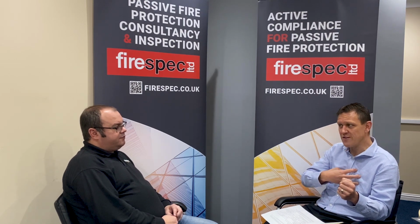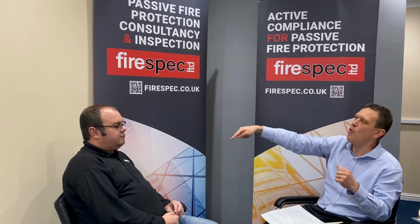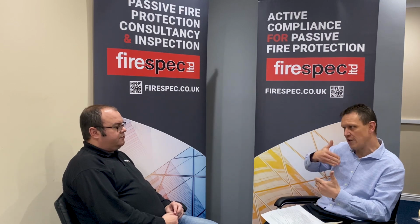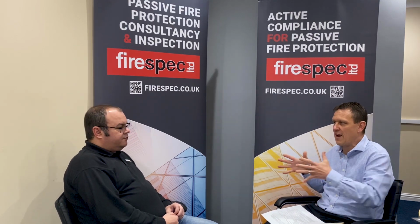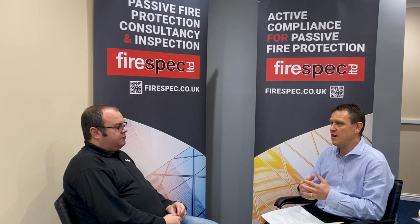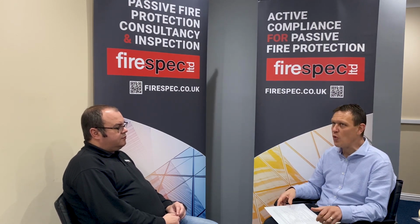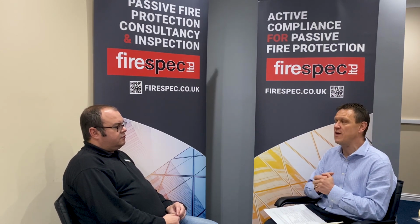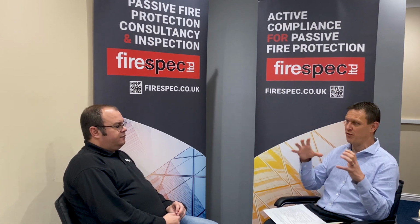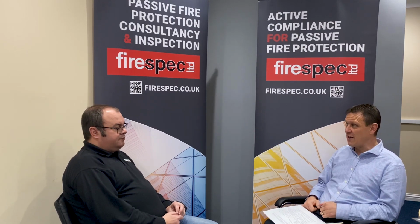Yeah. So we're going to consult on your fire stopping, which is getting installed around your surface penetrations 2 years from now, but they want us engaged because they want to start designing so early, because they know it's a long process to get to that compliance stage. Yeah. So absolutely, where we've seen the best return is where the earliest engagement is, because as I've come to realise, the only way to ensure you've got 100% compliance is when you design it right. You've got to have a compliant design before you can sign off on a compliant tested detail.